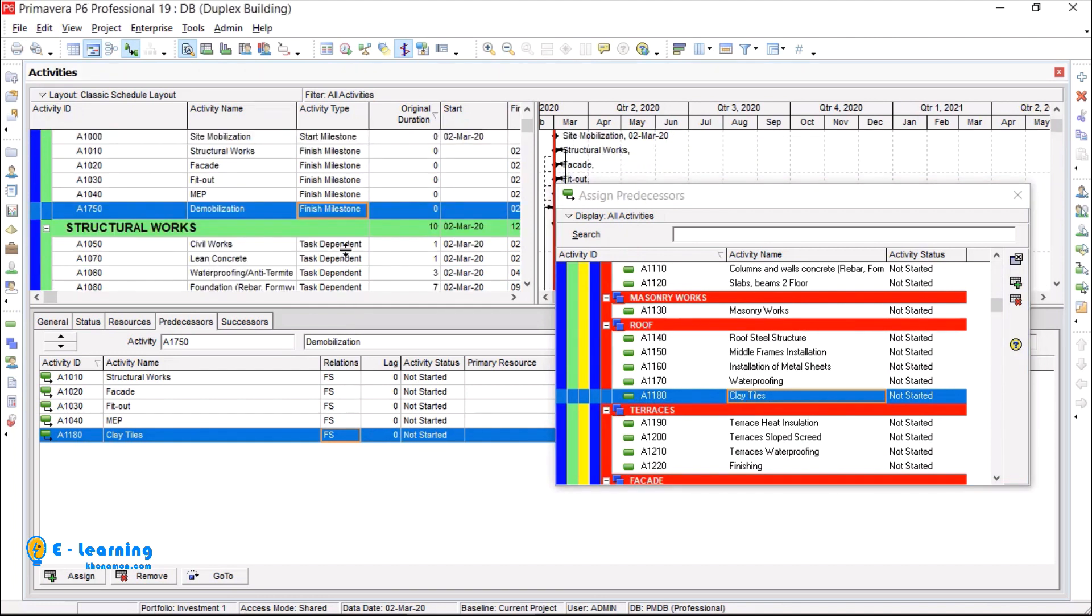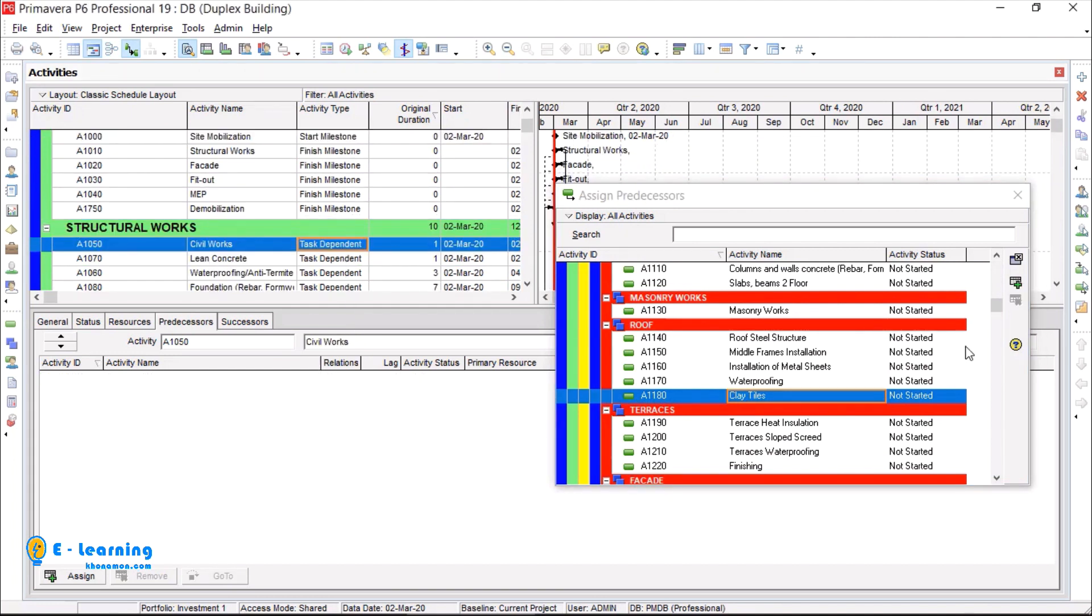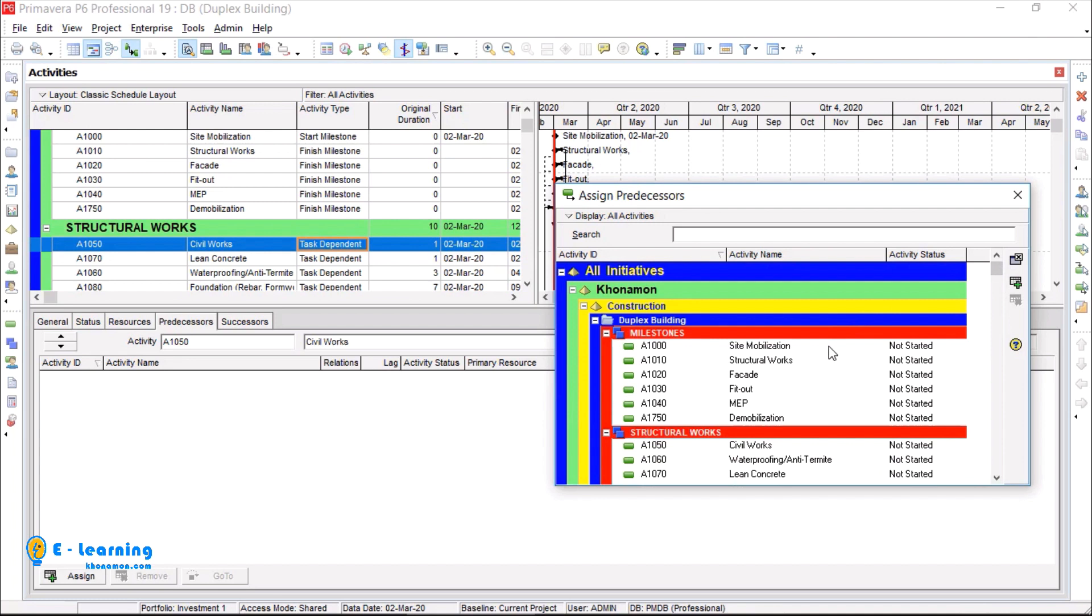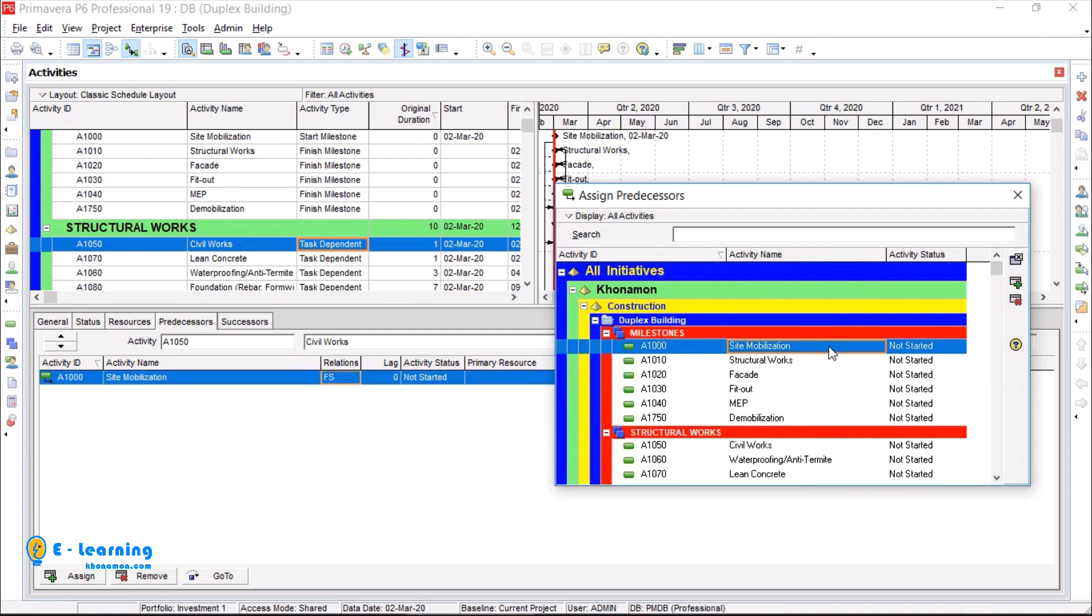Civil works is linked to site mobilization with FS and three days lag. This is possible.